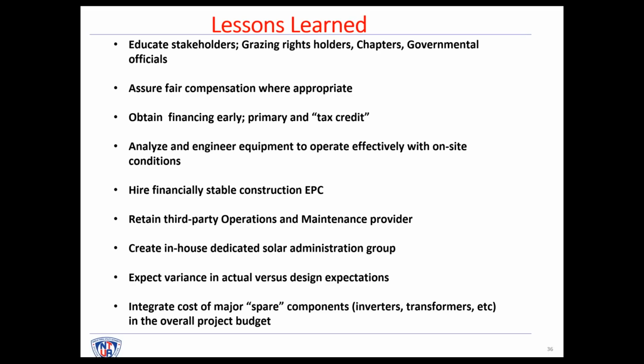Hire a financially stable construction EPC. Our first project, we had difficulty in getting an EPC contractor to work with a tribal entity because it hadn't been done before, a large utility scale solar project on tribal land. So the EPC contractor that we used finished the project and promptly went out of business. Not the best way to do business. So please make sure that the EPC contractor that you do utilize is financially stable.